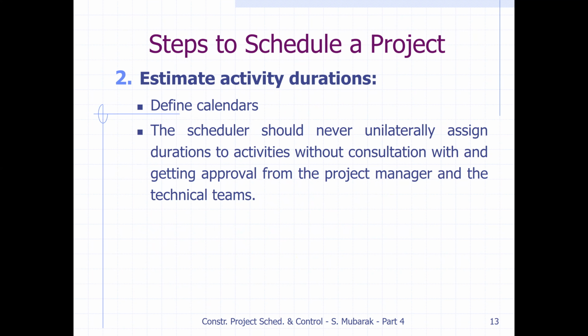Now let's see some more. We have to decide the calendar. The calendar is very important for deciding which 5 days are the working days. Friday and Saturday will be the holiday, or in the US maybe Saturday and Sunday will be the holiday. So we have to decide the calendar. During the year there are also some Eid holidays, like Eid al-Adha or Eid al-Fitr, or maybe Yom al-Watni. So what are the national holidays in each country? We can set the calendar according to that.